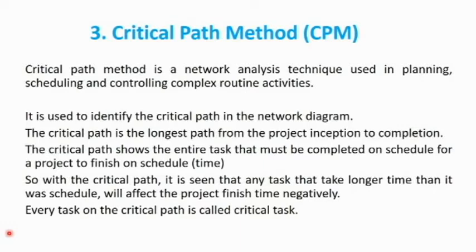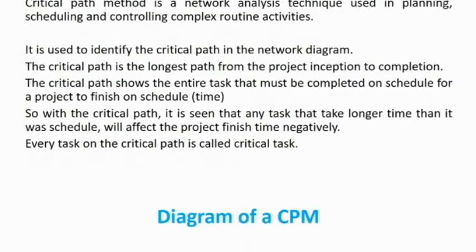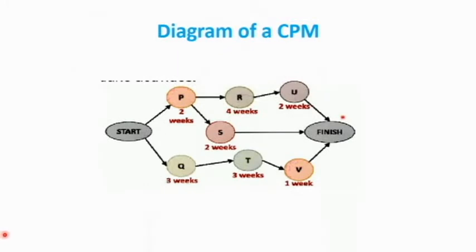So, with the critical path, it is seen that any task that takes longer than it was scheduled will affect the project finish time negatively. Also, every task on the critical path is called a critical task. Here is a diagram of a critical path model.